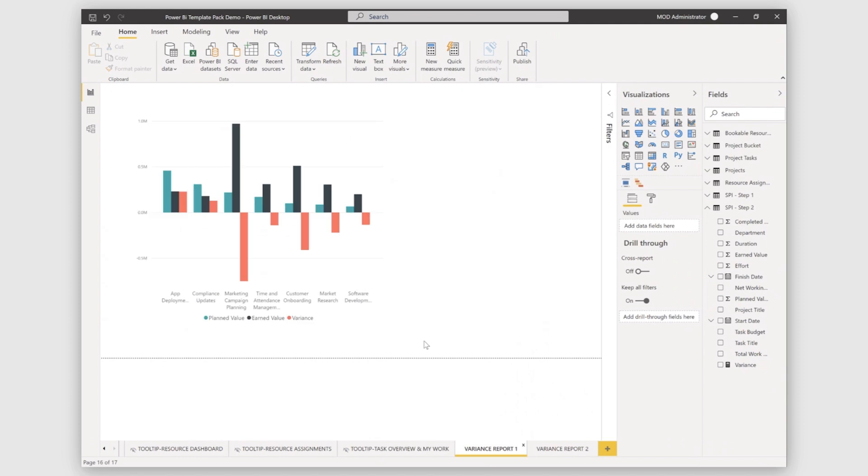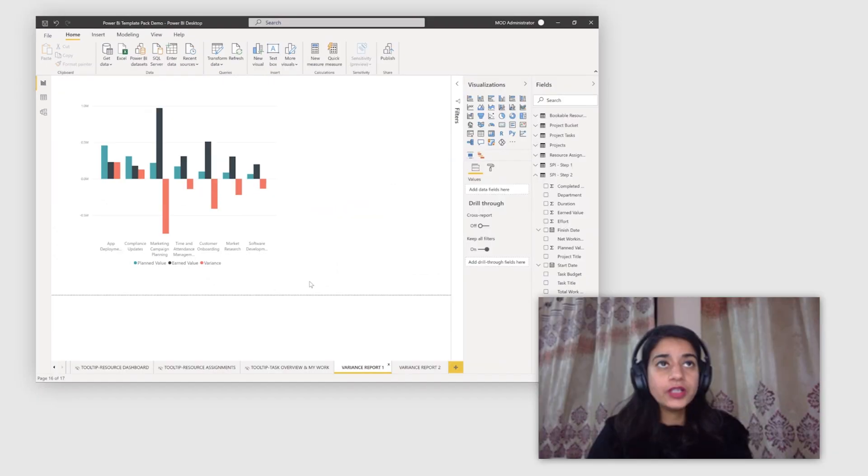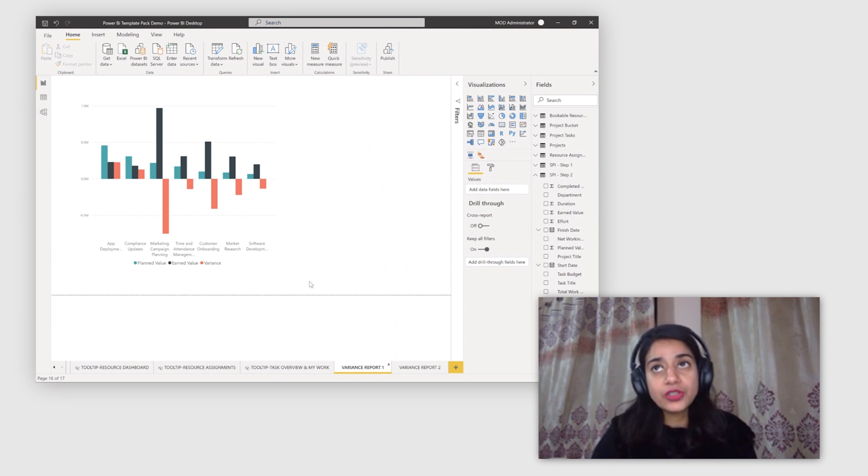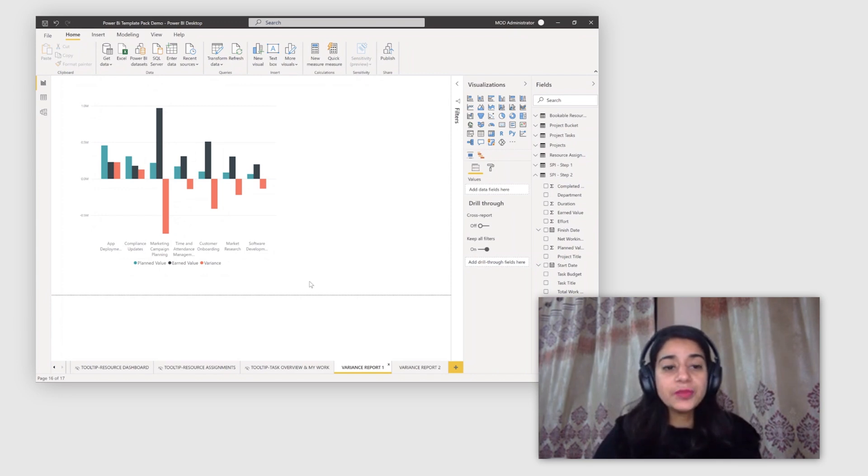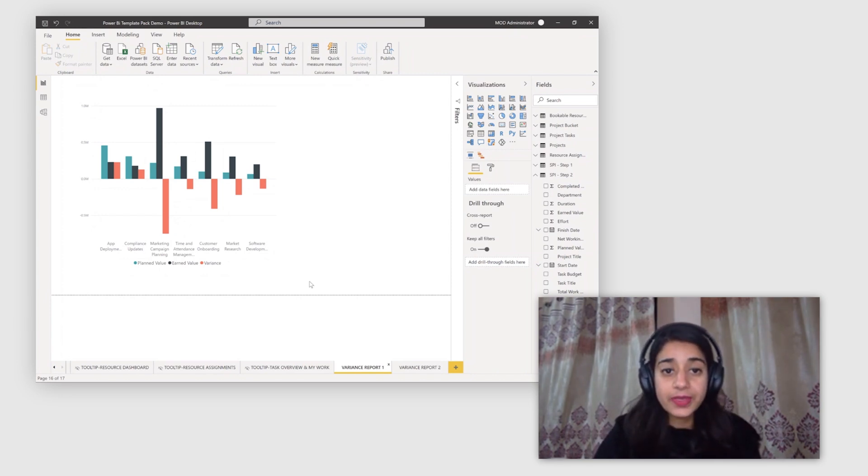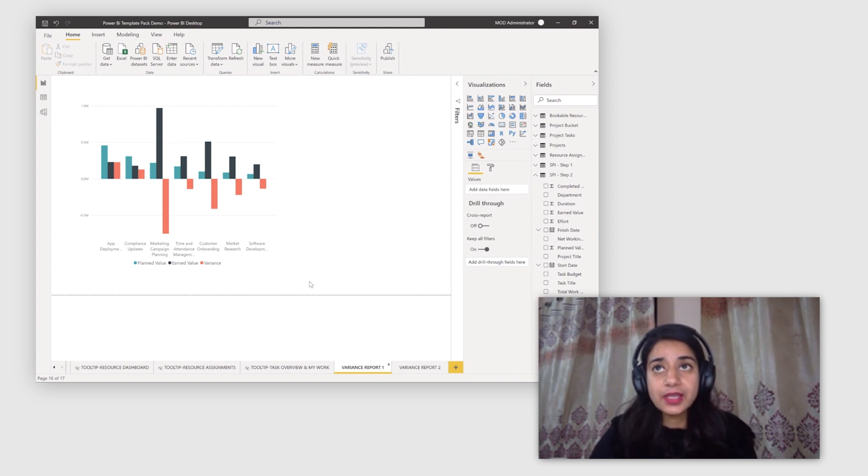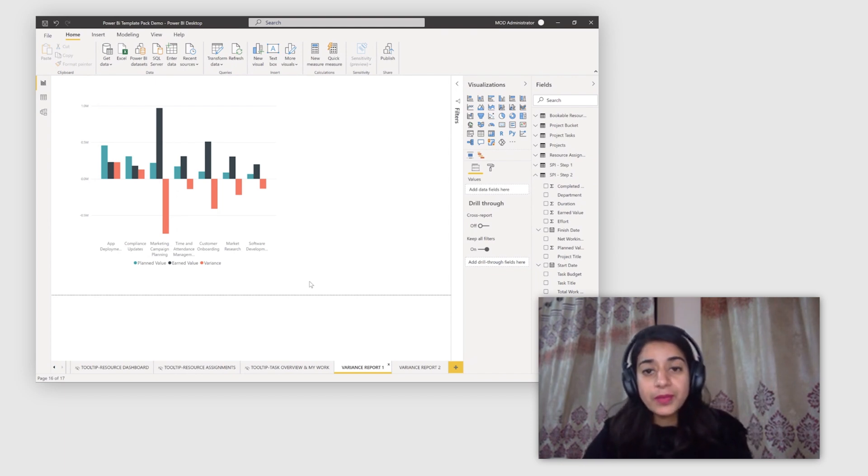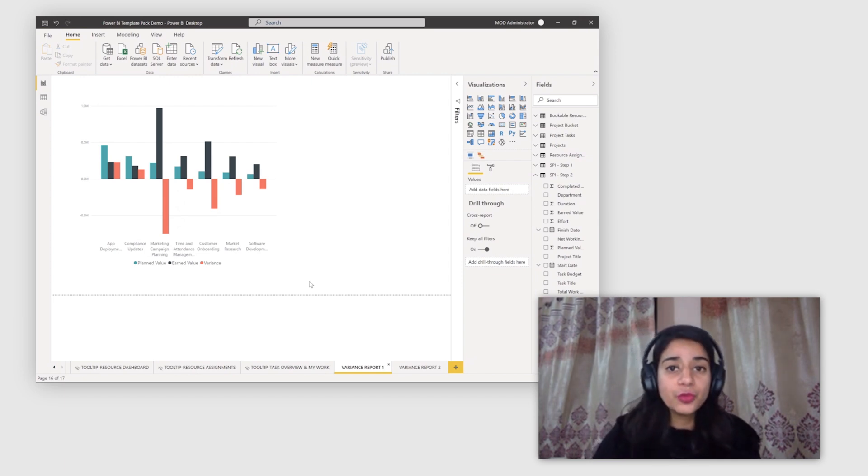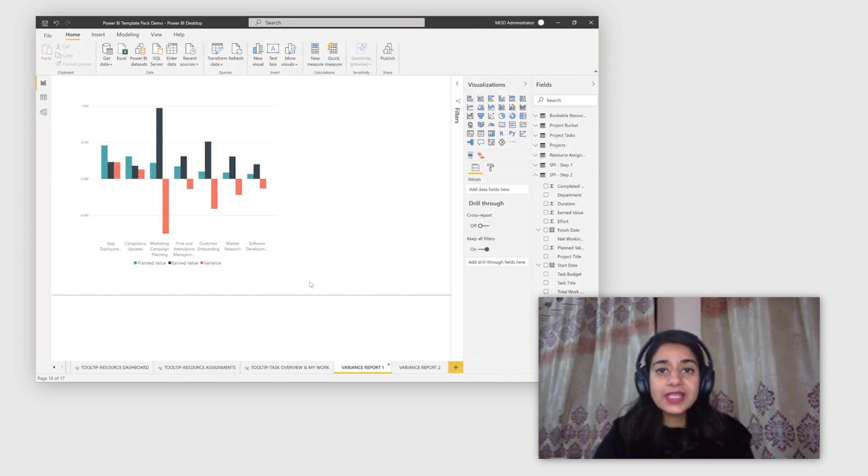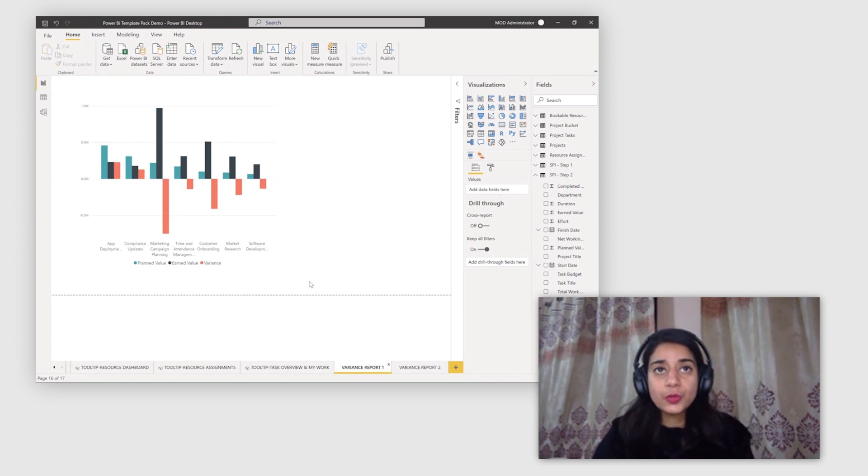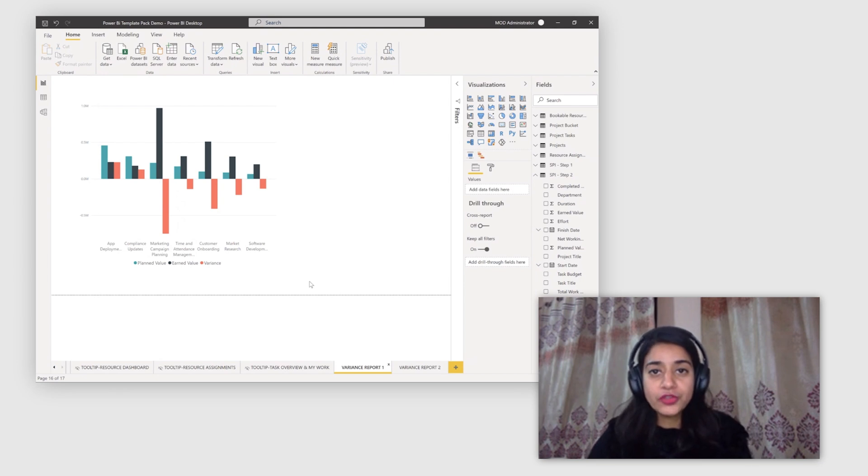So we'll take an example of schedule variance here. From a variance report, the team can see if the work they are getting done is actually the project's targets, or whether they are just spending time without ticking off the project milestones or project deliverables. For calculating variance, I would need planned values and earned values per task. The earned values calculated on how much the task is done multiplied by budget per task, and planned values how much task was supposed to be done by today multiplied by task budget. So for this example, my assumption is that my task budget is equal to fixed cost into the number of resources that are assigned to the task.